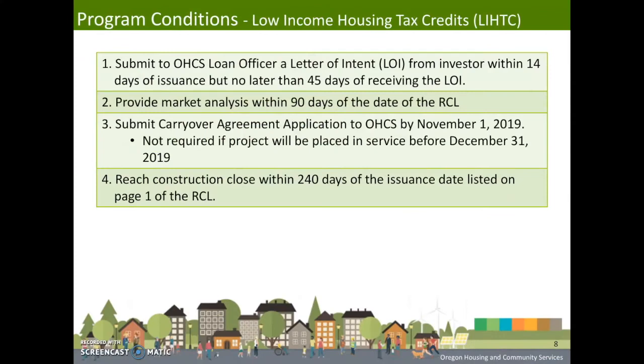OHCS requires that you submit letters of intent from your investors within 14 days of issuance. Provide OHCS with a market study within 90 days of the reservation conditions letter date, and submit a carryover agreement application provided by OHCS by November 1st of 2019 if the project will not be placed in service before December 31st of 2019. A little about carryover.